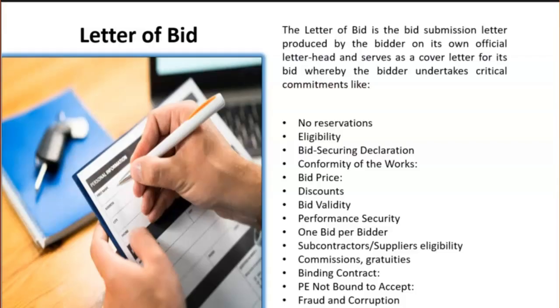The letter of bid is a key document that must be submitted by the bidder and must be signed by an authorized representative of the bidder with accompanying power of attorney. Absence of a duly filled letter of bid will lead the employer to determine that the bid is non-responsive.